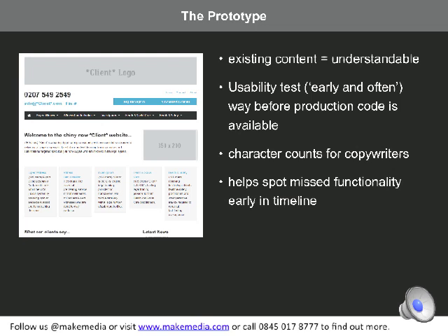And we spent a lot of time reviewing this with the client as well once we'd usability tested it, and we spotted quite early on that the client had missed out a couple of key aspects in their briefing process. So, 10%, 20% into the timeline of the project, we're obviously starting to see stuff that we've missed out. And it's a lot better to find that stuff out that early on than it is to find it right at the end of the process, when you're starting to release a test site for them to review,